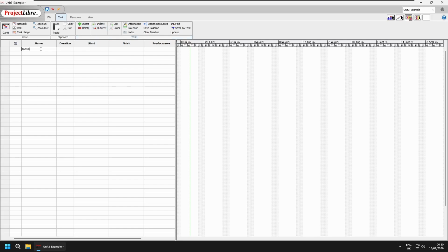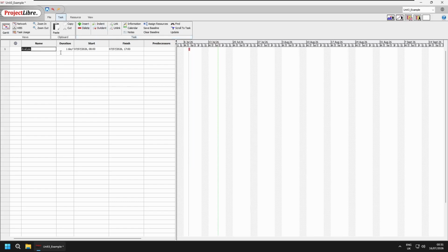So, for instance, if I have an analysis stage in my waterfall methodology, and then I have research market competition as a task on here, obviously analysis is the stage and the research is the actual task. So I'll want to indent that, and just like Microsoft Project, you'll see this goes bold, and this is now a stage rather than just a task. It's made up of everything underneath it.